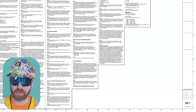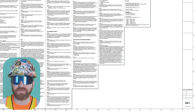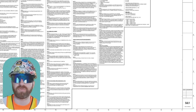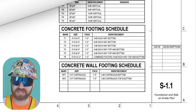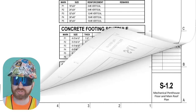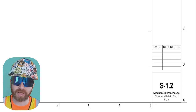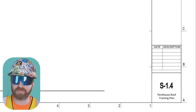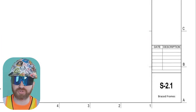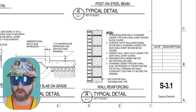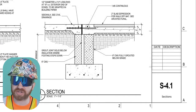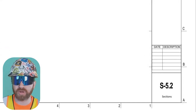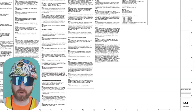I'm going to assume we did an initial pass through all the drawings — civil, architectural, mechanical, plumbing, etc. — and we're now going to focus on the structural drawings. So first we have S0.1, the general notes. Next is S1.1, foundation slab on grade plan. Then S1.2, mechanical penthouse floor and main roof plan. After that S1.3, lobby roof framing plan. Up next is S1.4, the penthouse roof framing plan. Then S2.1, braced frames; S3.1, typical details; S4.1, sections; S5.1, sections continued; and finally S5.2, sections continued again.